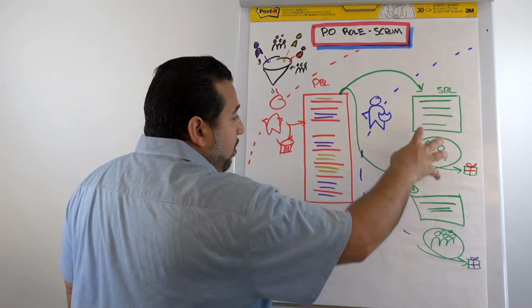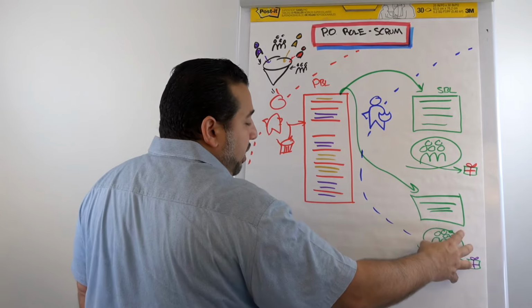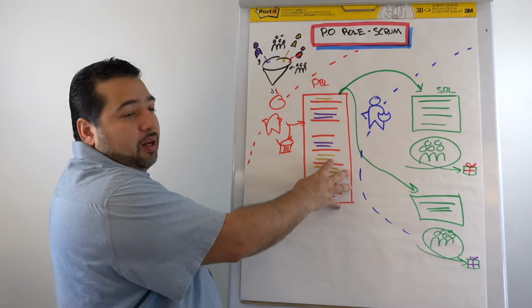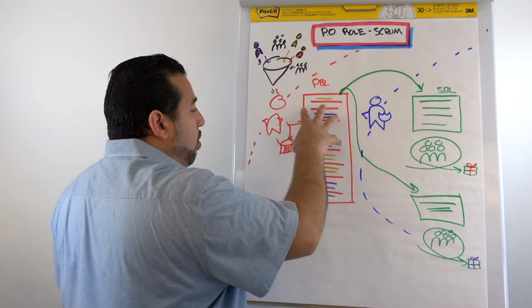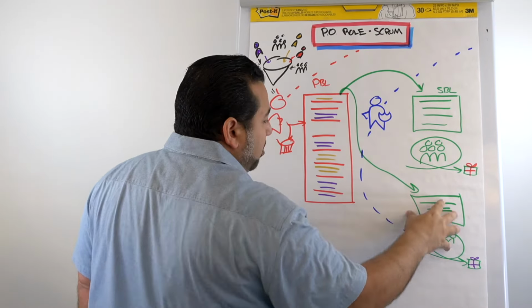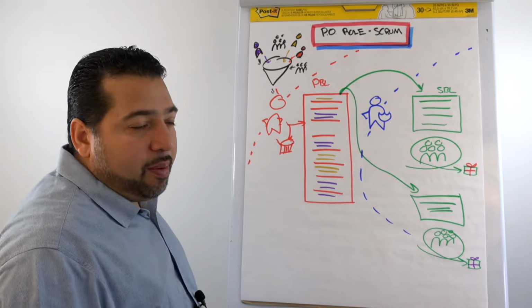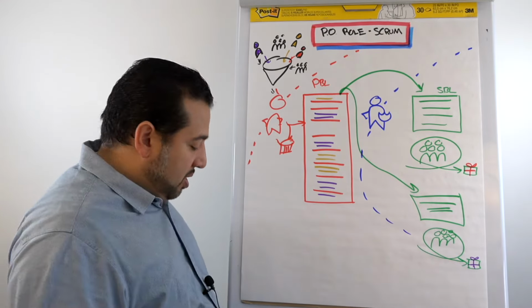And so from the development team's perspective, they each only have 1 product backlog. They each only have 1 product owner. From the product owner's perspective, they have 1 product backlog, but they might have multiple teams working off that product backlog, using some type of scaling technique.